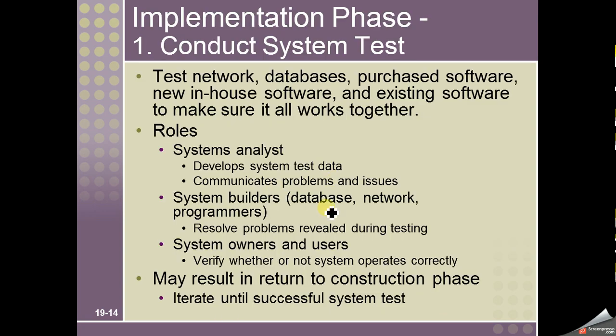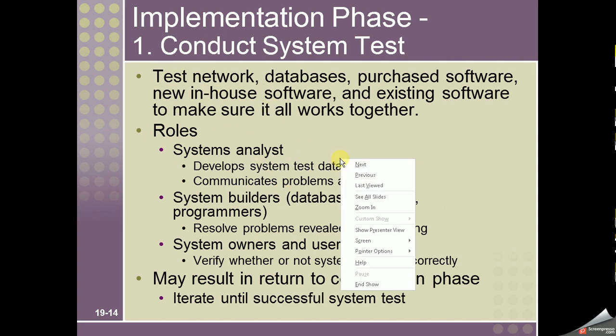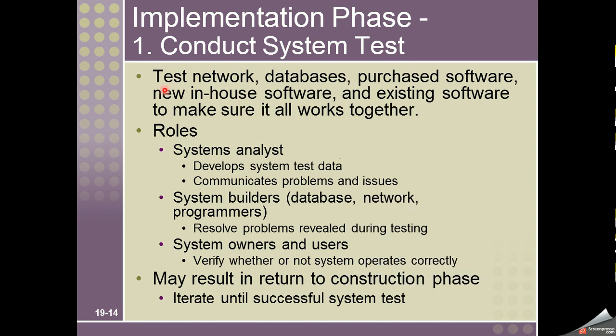So let's see details. First of all, we conduct system test. We test the network, database, purchased software, new in-house developed software, and existing software packages to make sure that it all works together, right? So the role of the system analyst is to develop the test data and communicate problems and issues with the concerned stakeholders.